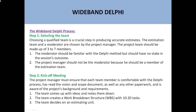The first step in the Wideband Delphi technique is selecting the team. The project manager selects a team of three to seven team members. The moderator should be familiar with the Delphi method but should have no stake in the session's outcome. The project manager should not be the moderator, because the PM should be a member of the estimation team. Think of this as a session where three to seven team members will be sitting in the meeting room.